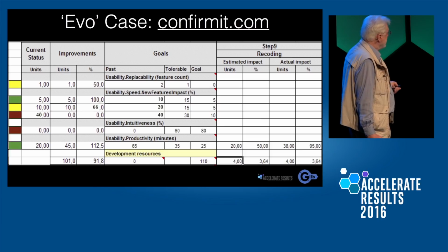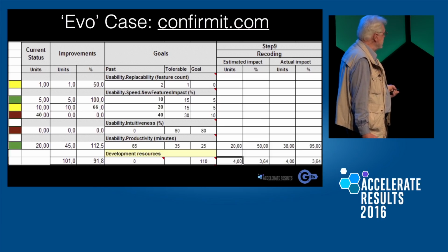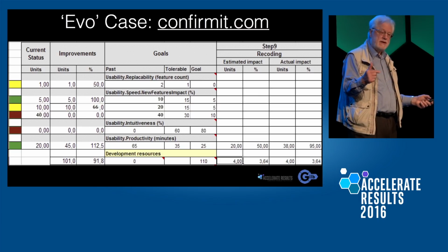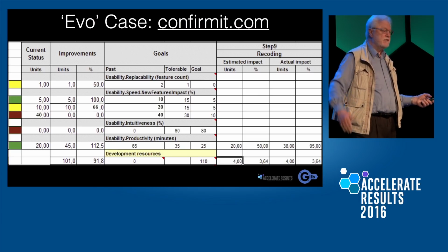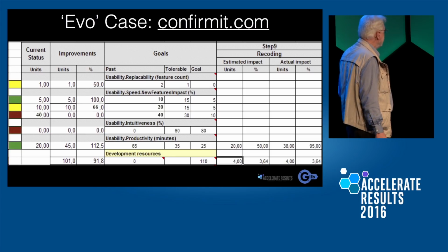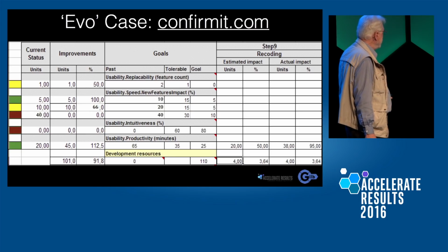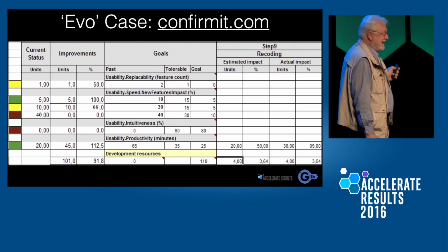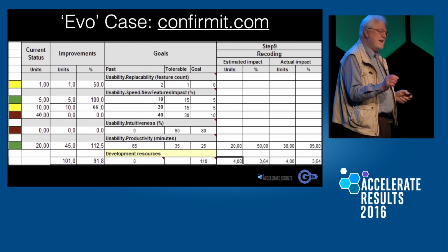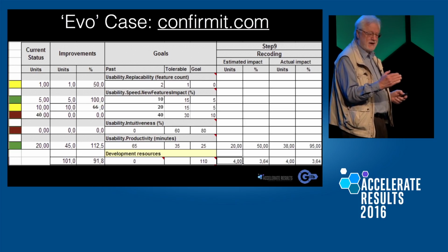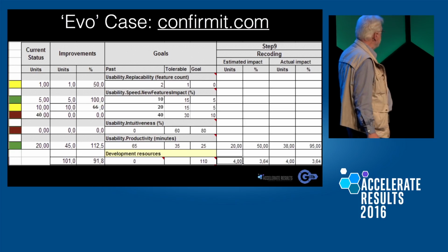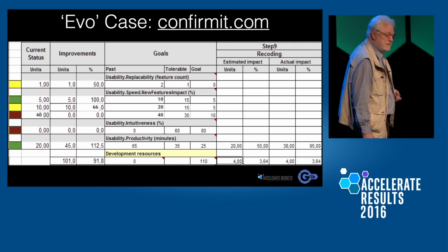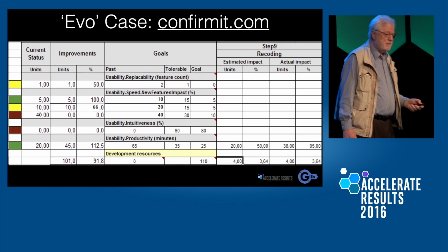So they did it. And at the end of the week, they delivered the integrated software to Microsoft Usability Labs, who kindly said, we will measure all your usability stuff for free overnight. They did. And Microsoft said, you know what? You saved 38 minutes. That's 95% of the goal. And then they said, let's use the weekend to fine-tune this to cross the border at 100, so we have the next 3 weeks to deal with bigger problems like 0, 0, and only 50 and 66%, which they probably cracked at the end of the day.